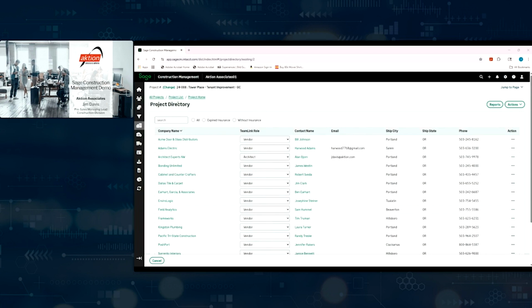Now, when I did that, notice what came up, my schedule of values. So they could come in and say, well, I'm billing $1,000 this week or this month, which would turn the percent complete different. Or they can come in here and say, well, I'm actually 98.5% complete. Well, then it's going to bill this much. And they can go save and next. And it's creating the invoice in the system for me.